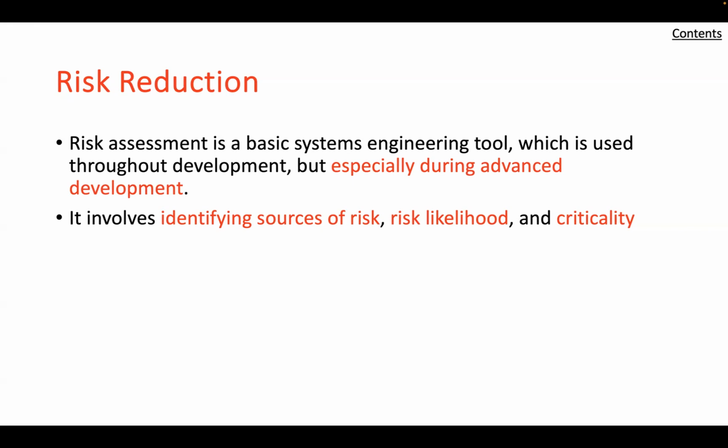The system engineer also has several strategies available beyond those of prototyping and testing. One, increased use of modeling and simulation over physical prototyping to ensure increased understanding of the environment and system processes. And two, interface development and testing before engineered components are available to reduce interface risk. Regardless of strategies ultimately employed to reduce risk, the program manager and systems engineer work hand in hand to ensure risk reduction occurs at the proper time.